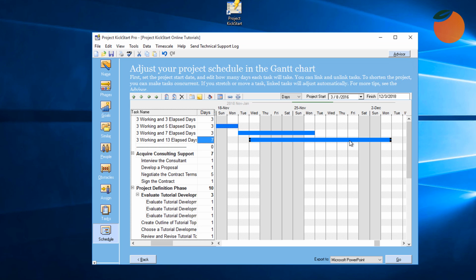Unfortunately, this task starts on the Wednesday before Thanksgiving and the intern is taking Friday off. After the 4-day holiday weekend, the intern returns to work Monday through Friday. Then there's another weekend, and this 3-day task finishes 13 days after it is started.